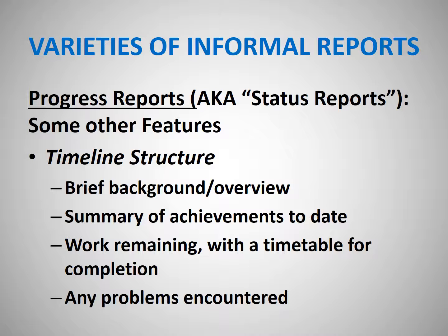Some other features that may be relevant to a progress report of this kind is setting up the memo itself as a timeline. So, background comes first, or overview, summary of achievements. That's the work that we've already gotten done. Work remaining.